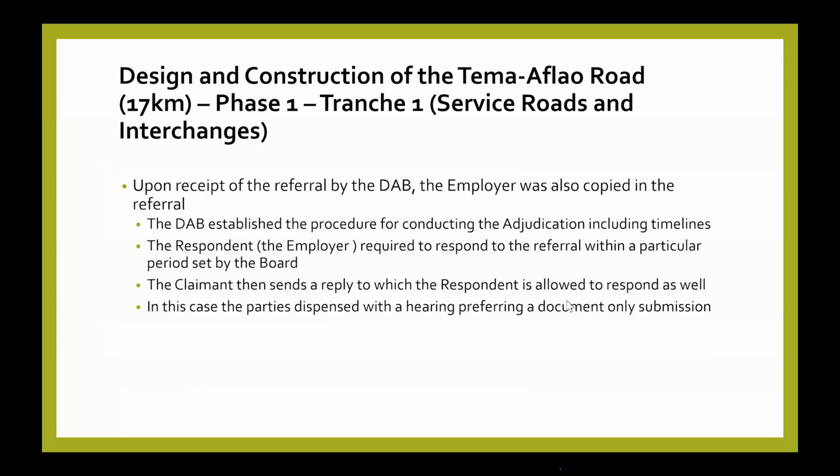Upon receipt of the referral, the DAB established a procedure for conducting the adjudication, including the timelines. The respondent, being the employer, was required to respond to the referral within a particular period of time. The claimant then sent a reply, and then we also responded. We both agreed to dispense with the hearing because we were of the opinion that the documents submitted were enough for the DAB to make a decision. So there was no hearing in this particular case, and the DAB agreed.